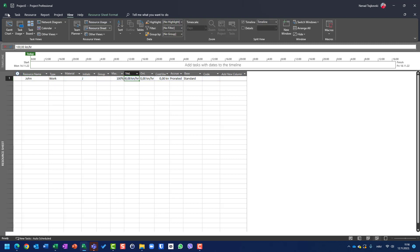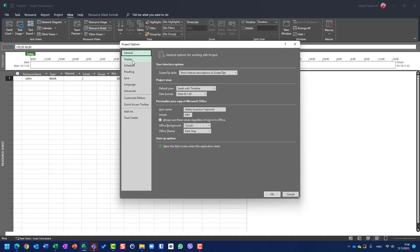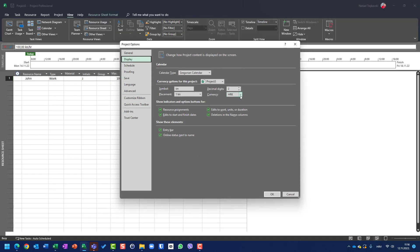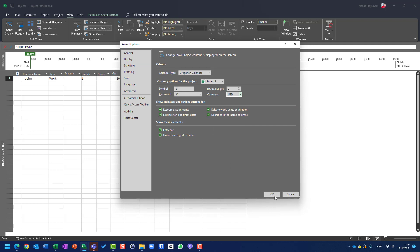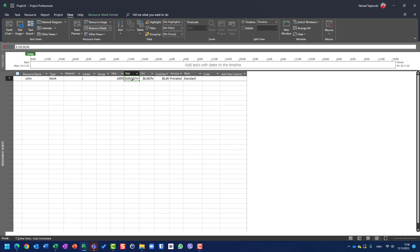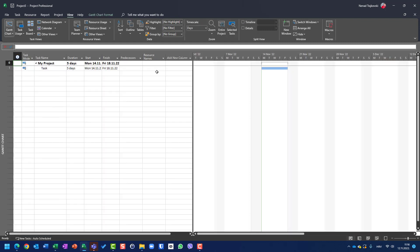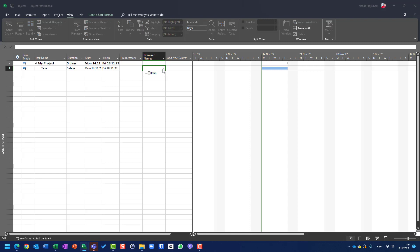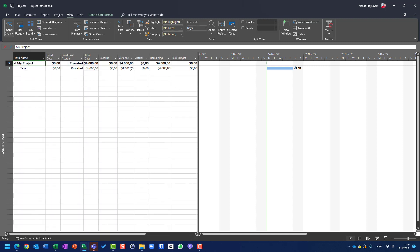I have local currency — I want US dollars. Let's go to Options, back to Display, and set US dollars. Now it's $100 per hour. I don't want this timeline. Now let's go to Gantt chart, assign John to this task, then go here and choose the cost table.